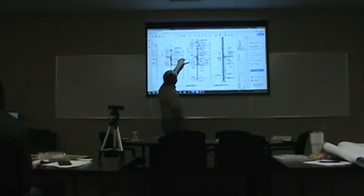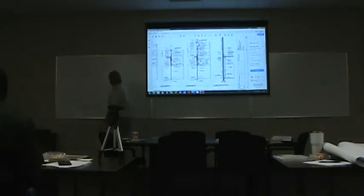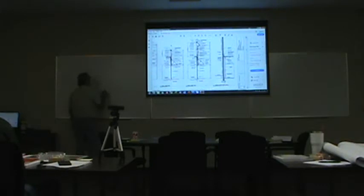Is there anything here on having a water barrier behind that EIFS? Yeah. Gosh, we left that off the schedule, didn't we? Oops. Flashing, ice and water shield. Thank you for picking up on that. Okay, I got to put up the flashing and ice and water shield. Both those are not related; they're parallel activities. Got to do that before we can start EIFS or brick. That is something to keep water from getting in the building.